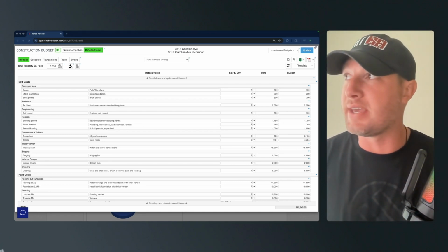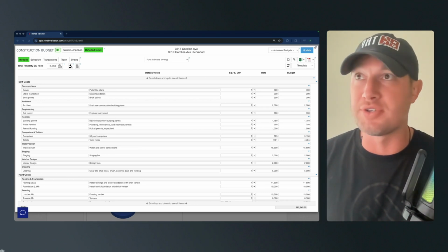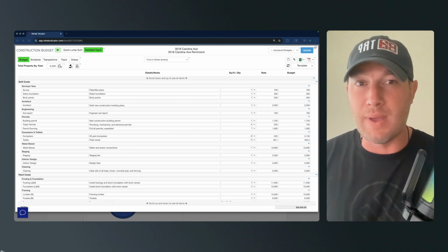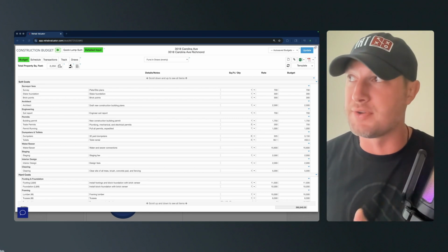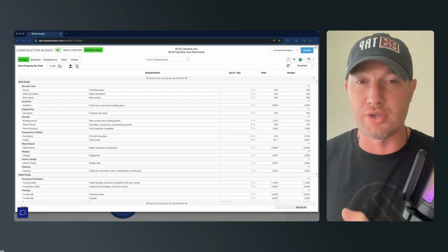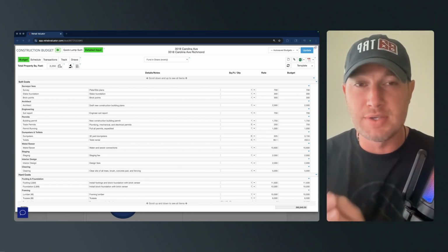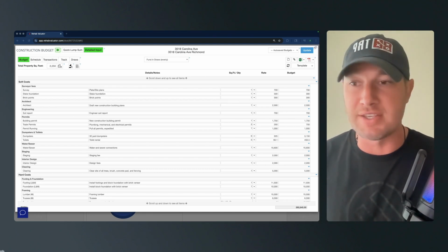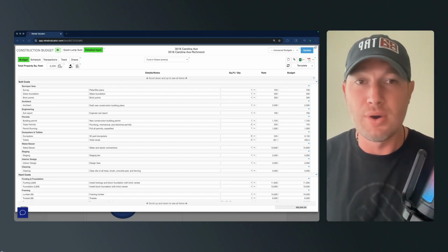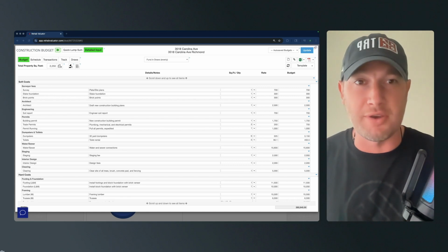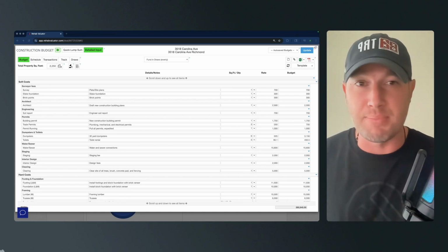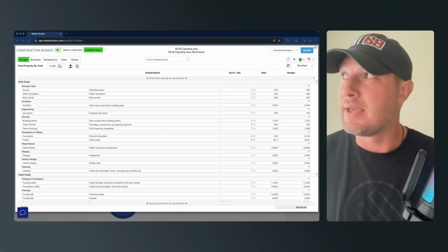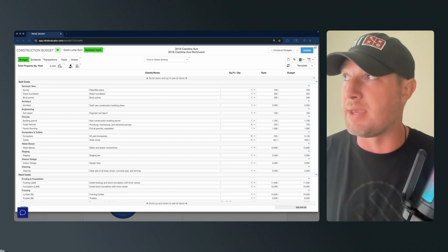And what you'll see is we start at the top here with our soft costs. And when we talk about where you're going to be the most vulnerable in new construction, it is always in soft costs, okay? It's always in site preparation or in permitting, the surveys, the engineering, the building plans, all that stuff. And I'll point out a few of them here.